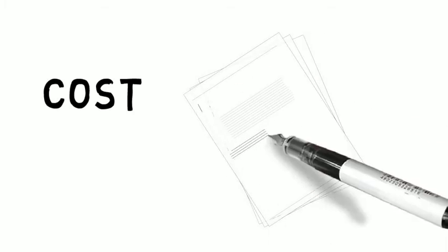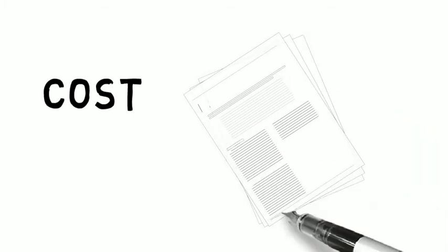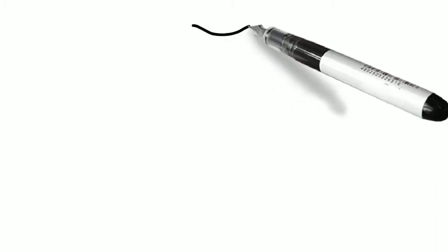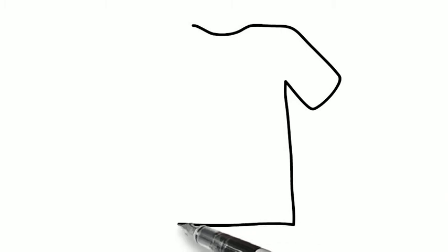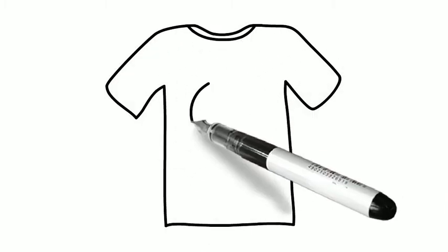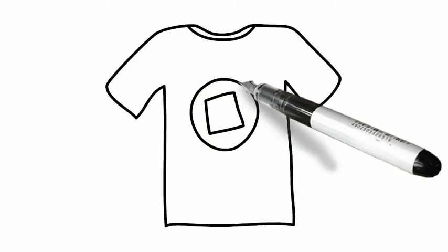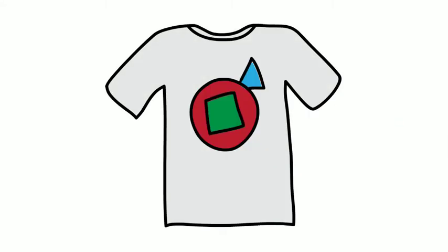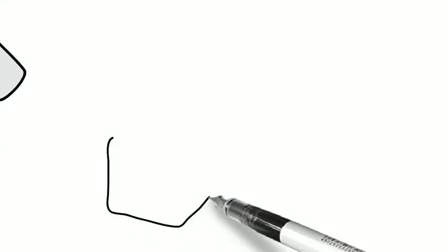Now we also need to look at what the cost of the investment is. And the cost of the investment, if it's a fixed price contract, is fairly easy. We just look at that fixed price contract. We understand what's in it. It tells us what the cost is. If we were doing the time and materials, we figured out what the reasonable amount was going to be by knowing the size of the work, and we can look at what the cost was in terms of time and materials. Hopefully, it was very close to what we had expected. If it changed a lot, we should plan for that as we review contracts and come to the next round of time and materials contracts.